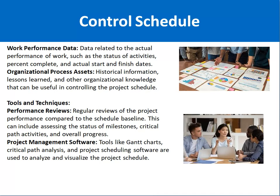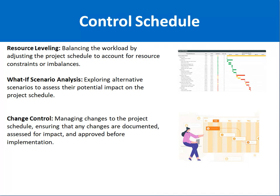Project management software such as Gantt charts, critical path analysis tools, and Microsoft Project are used to gain insight into the actual status of the project. Resource leveling means balancing the workload — since one resource may be over-occupied while another is underutilized, work should be divided equally among resources. What-if scenario analysis is the concept of alternative analysis: if a certain situation occurs, what are the available alternate options?